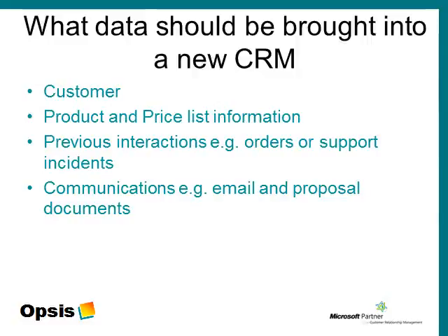There is also always the option of just leaving the data where it is and having a process that requires the use of CRM and one or more other products to complete particular tasks. This should be considered, and the benefits of having all the information moving forward in one place, as well as the ease for the user, compared to the effort of bringing in the data. Generally, the migration effort is a single, large, and perhaps painful effort for a few people, compared to an ongoing, niggling effort for many people.